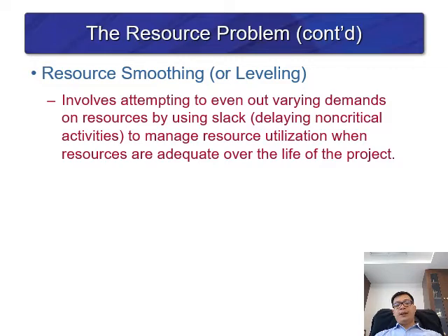In order to make the project smooth, sometimes the project manager uses the slack to ensure they have enough time to manage. And resource smoothing has another condition, which is that the resources are adequate over the life of the project, so there's no constraint.